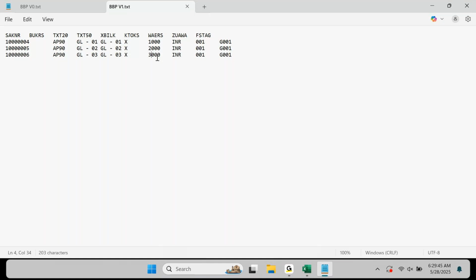Version 2. Whenever you submit the document, after submitting the document, if you get any correction, you have to create a next version. In that next version, make the correction so that tomorrow it is easy for you to tell that initially you did not give this requirement. This requirement is given later on. That is why it is part of version 1.